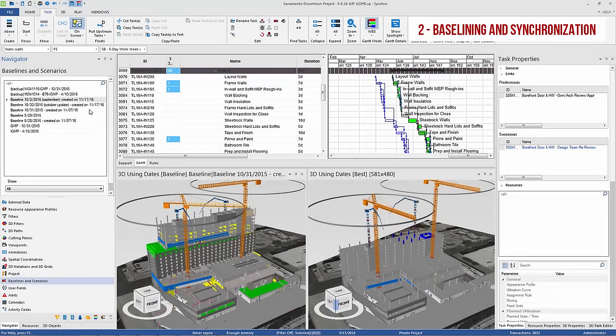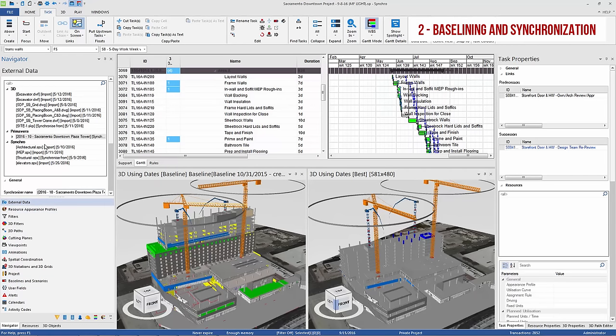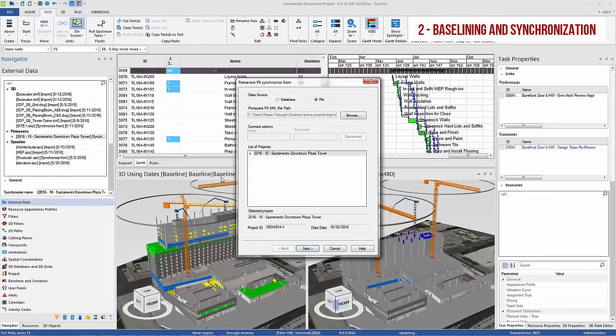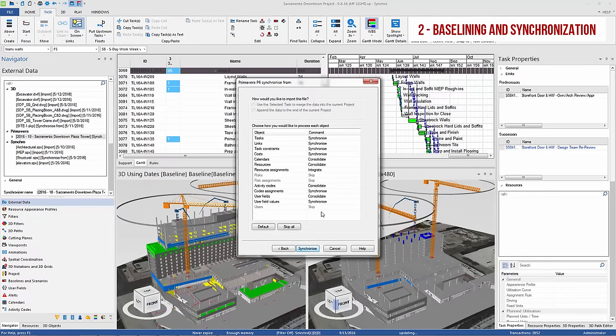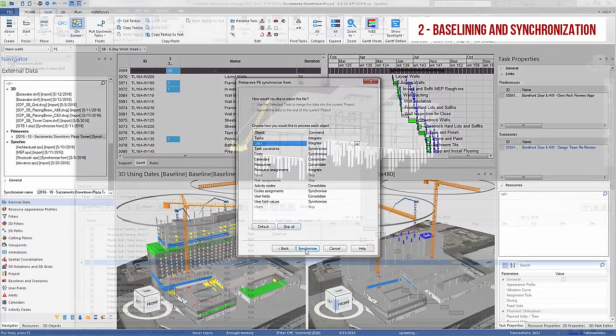Speaking of change, Synchro Pro allows you to save multiple baselines of your current schedule, and to synchronize back and forth with popular scheduling software such as Primavera P6, over a server or from an XML export with full control over the synchronization process, including the ability to retain detail or logistics activities added in Synchro by the 4D user.